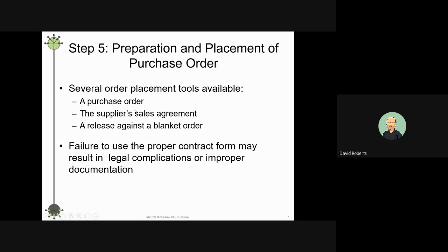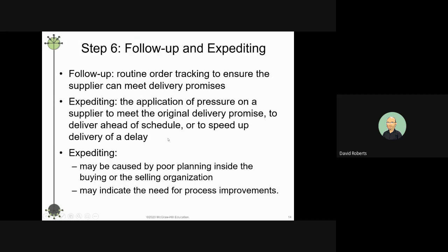Again, placing the purchase order, and a lot of work goes into that before you place the purchase order. And you can also place standing orders, etc. You follow up on it. You just don't cut a PO or issue a PO and then just expect it to follow up. You may need to have it expedited, maybe even de-expedited, maybe even sometimes break it down into thirds as opposed to receiving it all at one time.